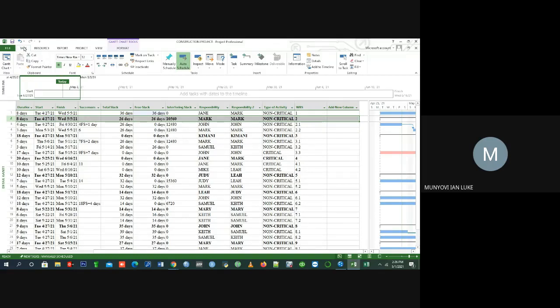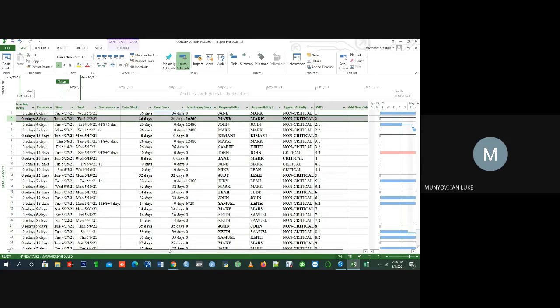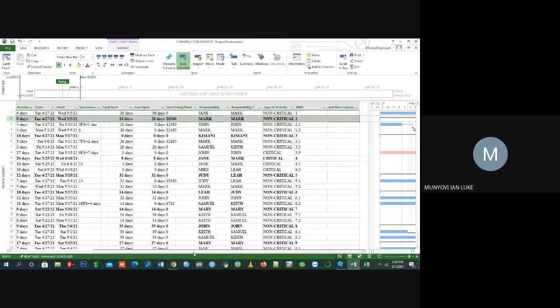So I was explaining about recurrent tasks. I said with recurrent tasks, these are activities that tend to be repetitive. And if you want to access recurrent tasks, you will go to the task tab. So while you're at the task tab, go to the ribbon. Among the ribbon where you're seeing insert, there's again task. Just go to the next one. Yes, so click on that drop down. And then there's an option of recurring task.